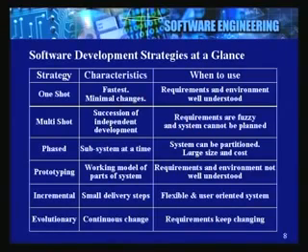Okay. So evolutionary, now today most of these particular projects have a deadline commitment, and in case you are interested in meeting a very stiff deadline, then undertaking an evolutionary kind of approach would be a difficult task. But if you had enough time, money and resources at your disposal, you could undertake this particular approach.